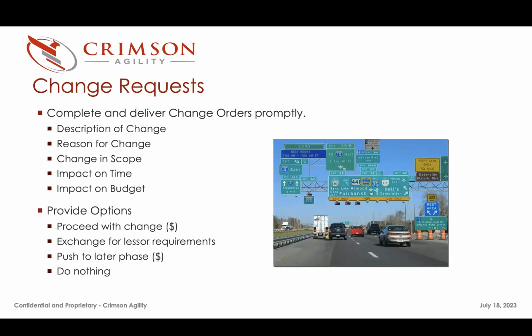You can push it to a later phase. It's still going to cost them money, but let's get the site launched. Sometimes it's better to do that than impact the timeline or the budget. Doing it at a later phase, it can roll over into ad hoc services or a managed services plan. And I like to propose what I call a fast follow. We're going to launch without it. Within the first 2 or 3 weeks of the site being launched, we'll complete these fast follow items and get them done under your managed services contract.